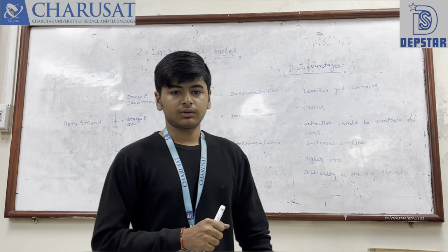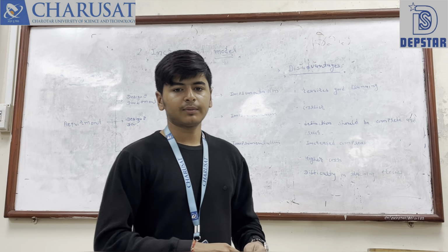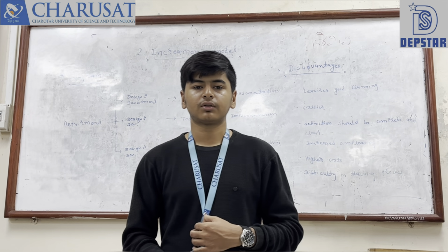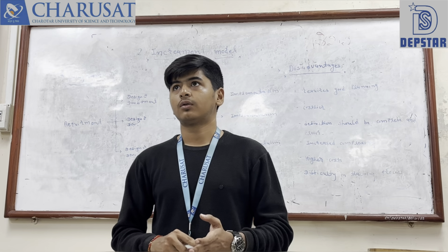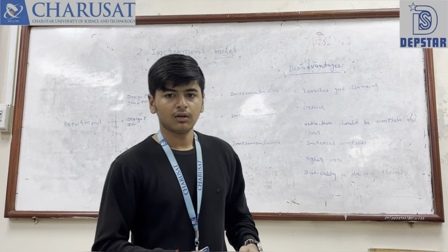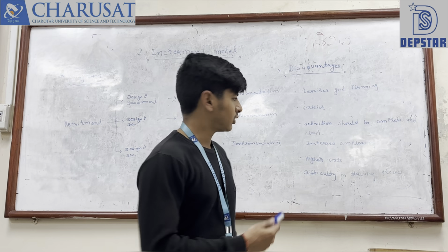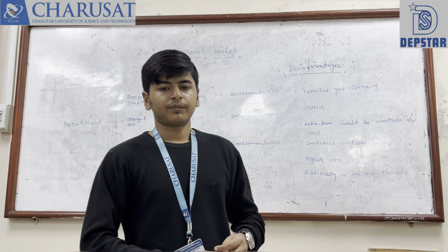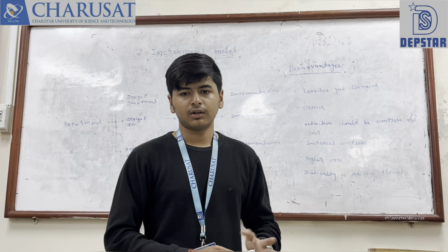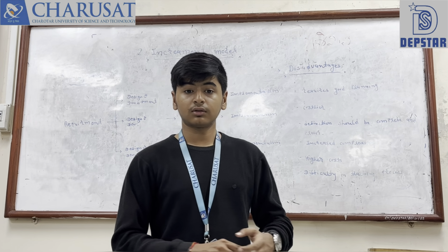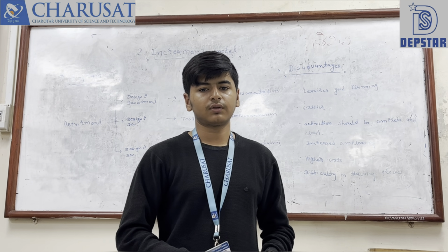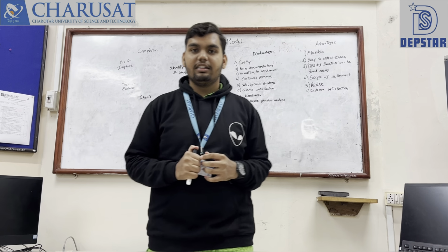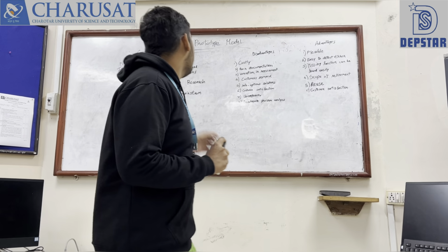Next one is higher cost. Since each increment requires its own planning, designing, coding and testing, the overall cost of this model is higher than with other development methodologies. Last one is difficulties in tracking progress. So with multiple increments being developed simultaneously, it can be challenging to track the progress of the project as a whole.